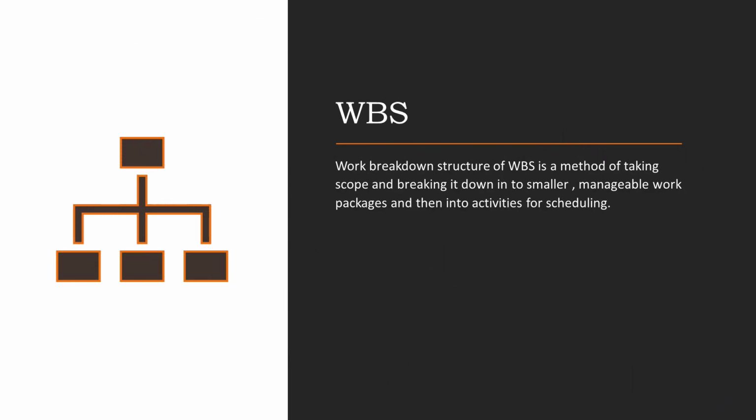Work breakdown structure, or WBS, is a method of taking scope and breaking it down into smaller, manageable work packages, and then into activities for scheduling. This is just an example, and we will use Excel to build our work breakdown structure and schedule.